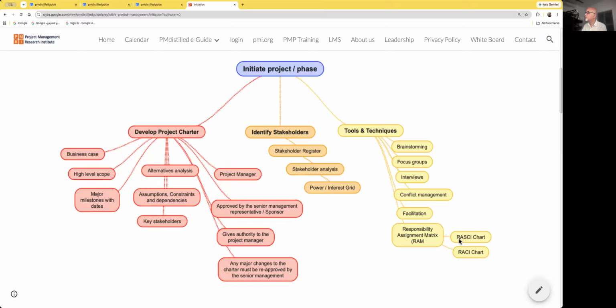So, who is responsible for that particular activity? Who is accountable for it? Who must support it or sign it off? Who must be consulted? And to whom we must send for information's sake. Another variant is the RACI, that is responsible, accountable, consultative, and information. A detailed description of this RACI chart and all is available in the supporting page.